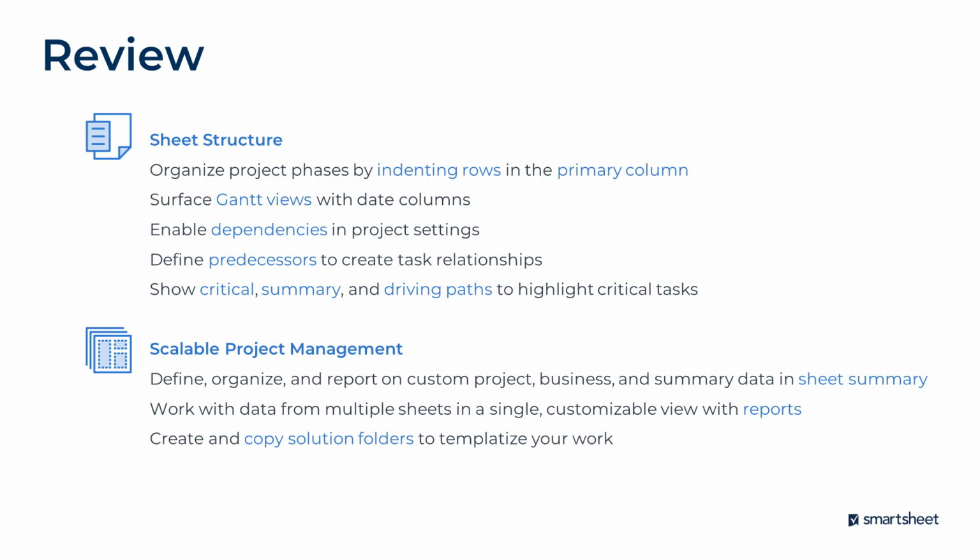Once you've created these different items to manage your work, so sheets, reports, as well as dashboards, rather than building from scratch every time that you're kicking off a new project, moving these items into a single folder sets you up to be able to templatize a full solution. And whether you need to run the same type of project multiple times, or you're looking to create a structure your team can use to manage projects, a folder can easily be copied to kick off a new project with new sheets, reports, and dashboards that all work together.